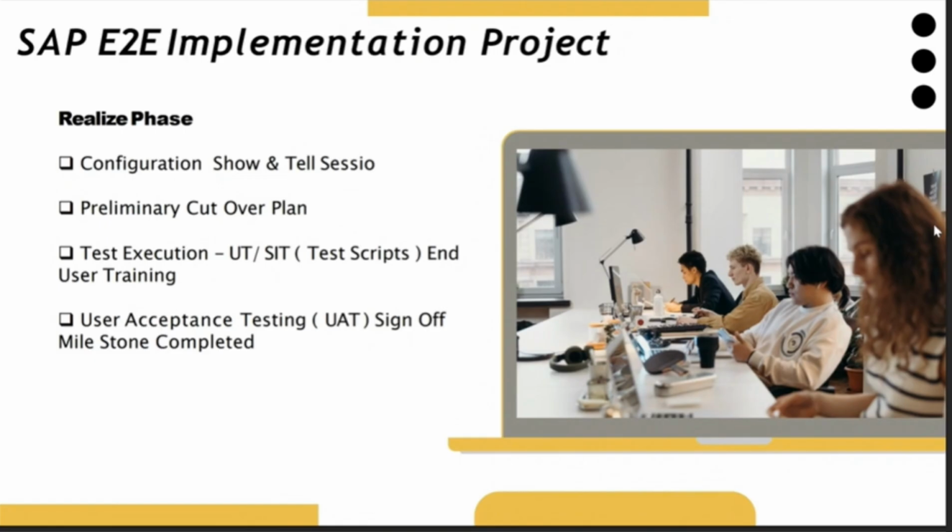Fourth, you have to allow the user to execute the business process. Now he will update success, failure, dump, everything in the test scripts. He will say this process executed, this process errored, this process dumped, this process had a runtime error, and he will update it, right? So this is for user acceptance testing. This exposure also, you will be exploring here.